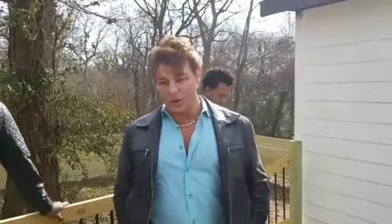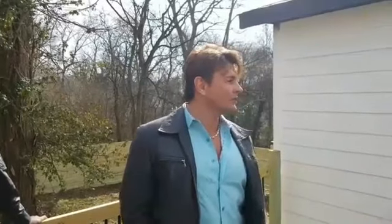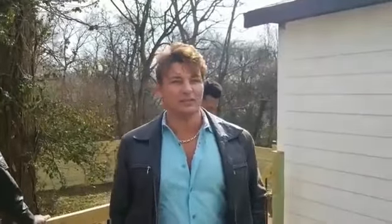All right, two more quick questions. Based on what you said about having that many renovations a month, David asked, how many crews do you have? Four crews. All right. And then Tony asked, what is the average time you hold the property, buy, rehab it, and then sell it? What's that average holding time from start to finish? The goal is to turn your money 3 times a year. So every 4 months you should be in and out of your property. Now, can you get in and out of a full rehab like this in 4 months? If your permit process goes without a hitch, yes. It all depends on the city. If you got permit issues and you got to get your structural engineer to get a letter and all that kind of thing, no. But it is what it is.